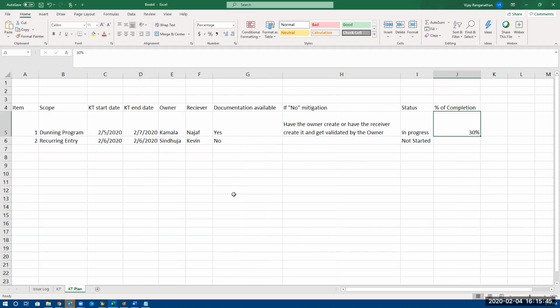In project management, if somebody asks you what's the percentage of completion, nobody can tell this, right? You cannot quantify by percentage. You cannot say 50% complete, 30% completed. It is just a ballpark, but if somebody is telling me 50% completed, I wouldn't be satisfied because you don't know how long the other 50% will take, right?